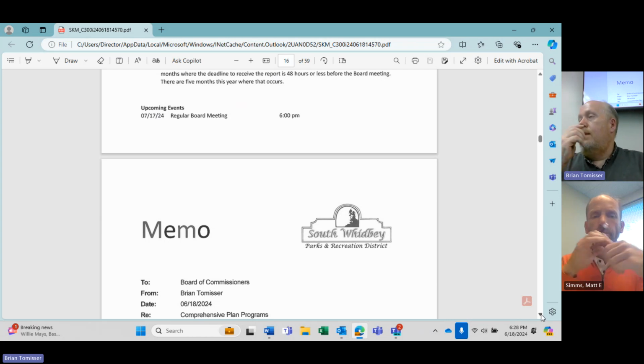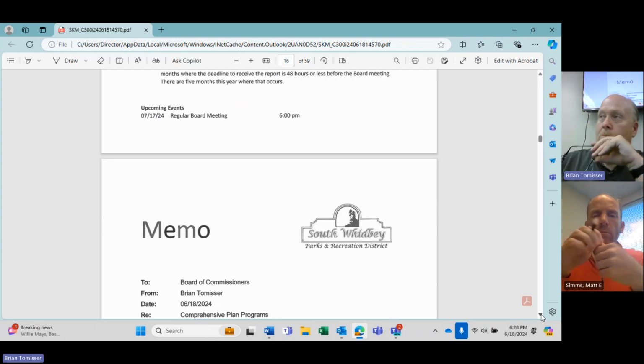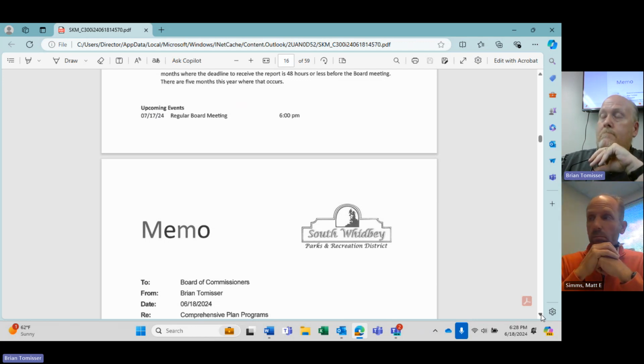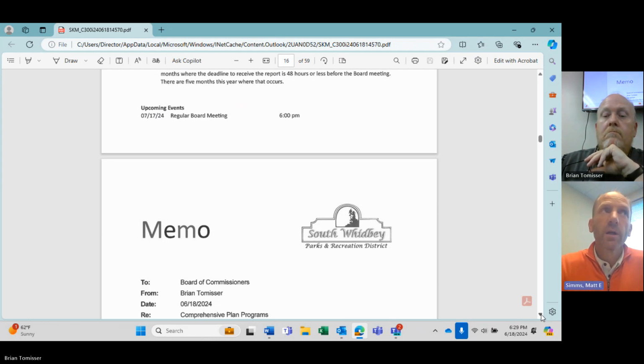But we also realized that we didn't want construction projects on both sides of the park. There are things like access and roads, and if one side of the park is kind of closed because there's construction going on, we can't do the same on the other side. So kind of looking at that overall bigger picture for the entire area. And remember our RCO funding windows are application deadline in spring 2026 and spring 2028, overlapping your timeline.